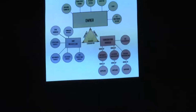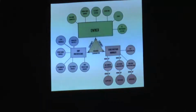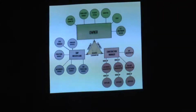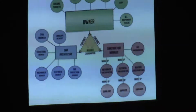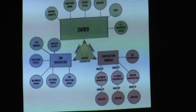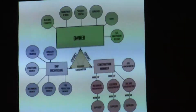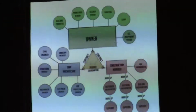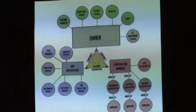But it won't go above whatever might be approved. You can't. No, I don't believe the building is going to be totally different at all. But the fact of the matter is that when the warrant article is successful, it comes in at $1,920,000, and that is the amount of money that can be expended. You can't expend more. Short of having another town meeting, and we're not going to get to that point. So the first thing will be to have North Point here to do a true assessment of the site, wetlands and other items, not just that, but other items.